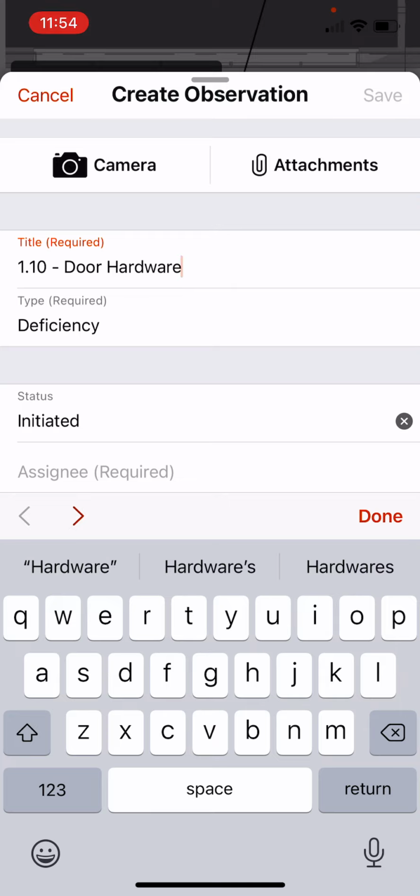Now, let's say we have a camera that's going to be installed. The cameras are supposed to be installed on a back box that's a dual gang electrical box, all right? Or another good example would be that we have card readers that need to be installed still. We've dropped our cable there and everything already, but we can't install our card reader yet because the walls are not finished.